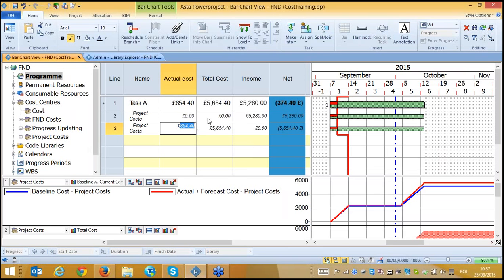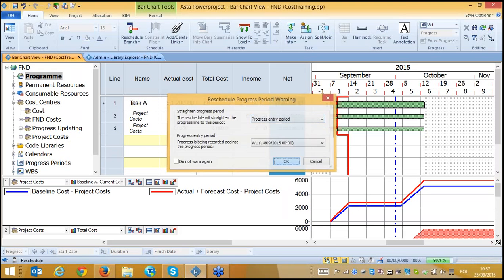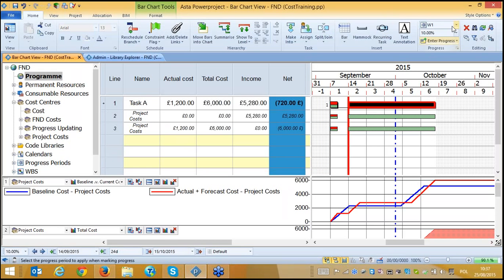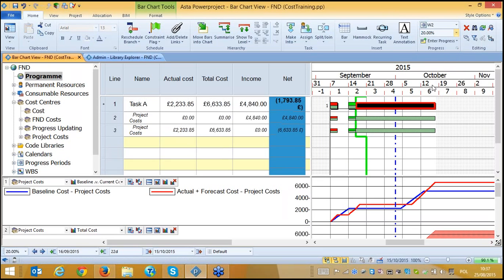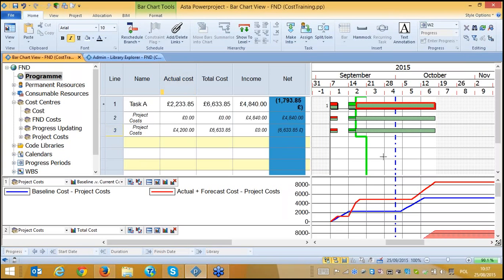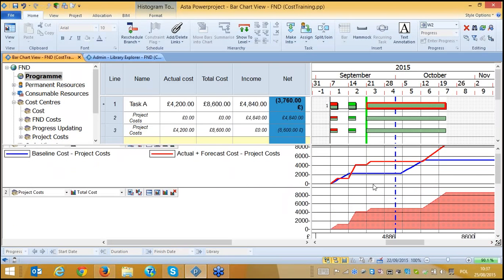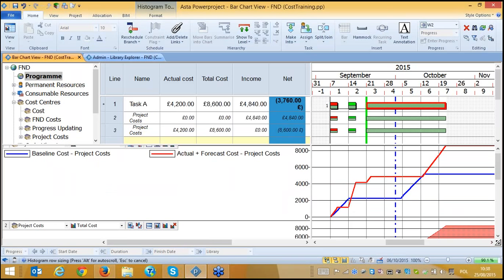It is actually coming like planned actual cost, but anytime I can change it. My cost was more than I thought, and you see now I have a difference. I have now more than I have planned for the cost, so you see the differences immediately. And I press F9 to schedule my project, and now let's go to week 2, and here we enter, for example, 20% of cost, and maybe we exaggerate a bit to see the difference, to 3000. Here it is giving the total, and now you see our difference between baseline and the actual one.